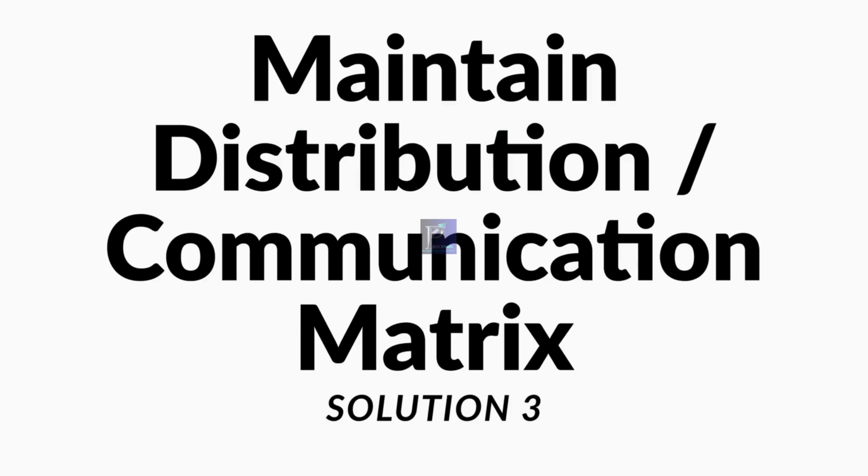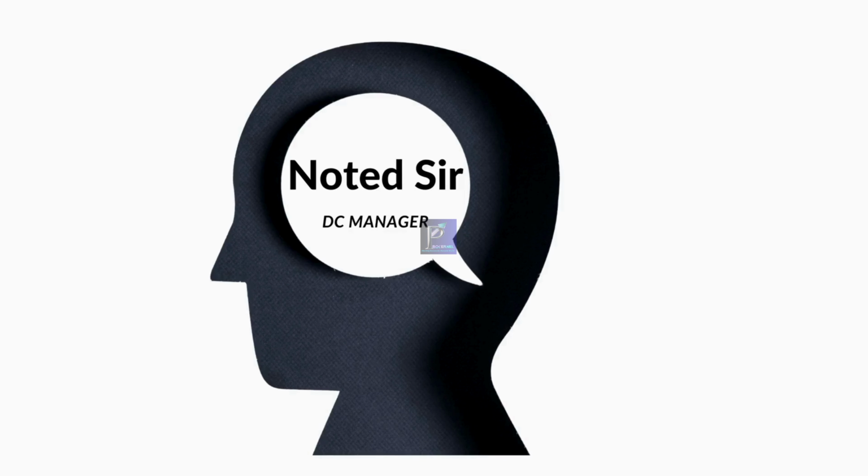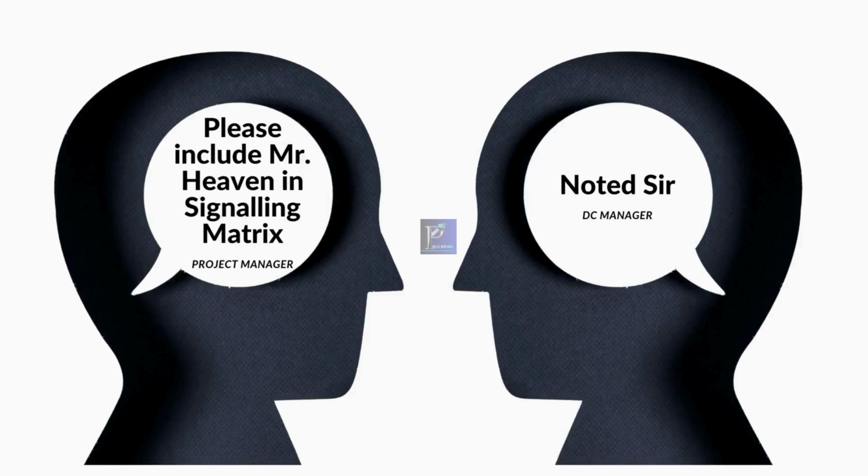Yes, that's the third point. Keep distribution groups up to date. In a dynamic project environment, the site team must coordinate proactively with the document control team or PMS team to update the matrix and ensure drawings reach the correct people.